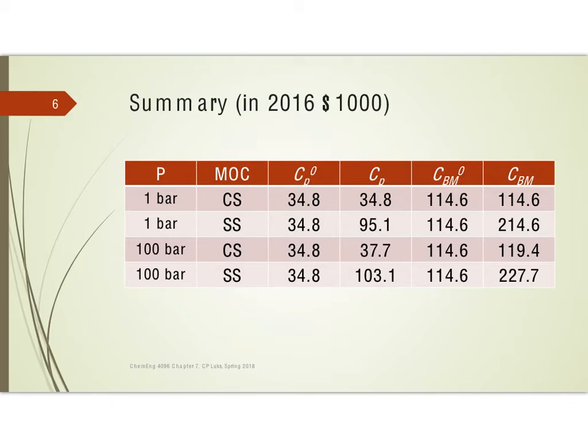So, in 2016 dollars, the answers that I got, C sub P0 was 34.8 thousand for all of them because they are all the same size equipment. C sub P, the purchase price of the equipment for the carbon steel at one bar, it's just going to be the same number, 34.8. If I increase the pressure to 100 bar, I'm going to see that it's 37.7. So it goes up slightly when I increase the pressure rather substantially. If I change materials without changing the pressure, the final answer is much larger, 95,000 instead of 35,000. And if I have the changed material and changed pressure, 103,000. That's just to purchase the equipment.